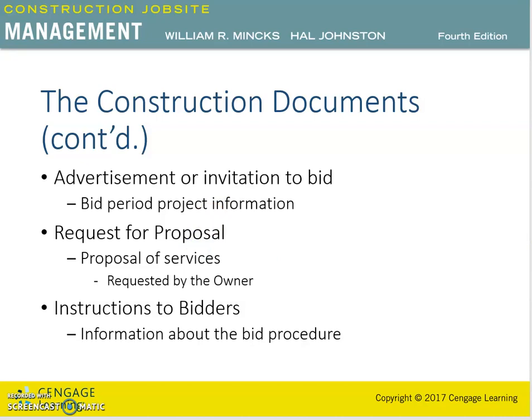The next document is the request for proposal. Normally this type of document is requested by the owner, and it is similar to the invitation to bid, but normally the request for proposal is used in design-build and some construction management projects.